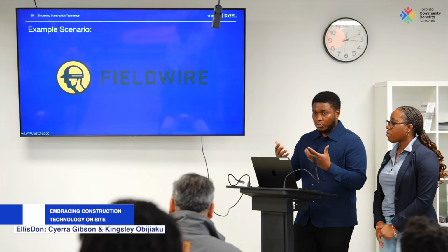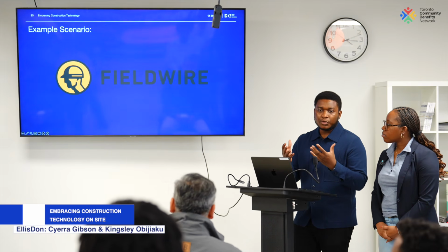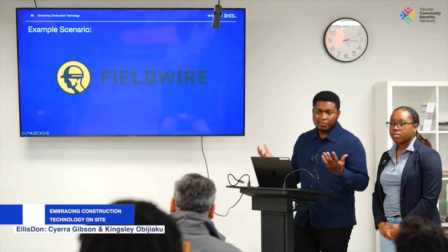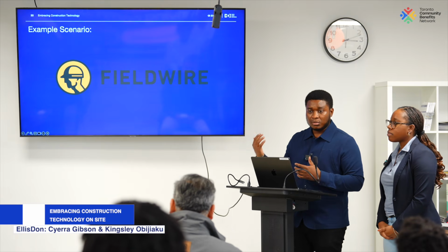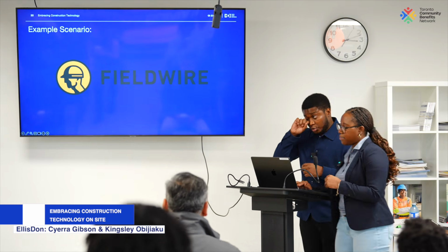How we use FieldWire, like I said, is to track progress, to communicate, and to share updates with owners and subcontractors. If you're a subcontractor, how you use it is slightly different. We encourage you to share progress reports, to communicate conditions on site, and to communicate with the GC, right? It's to track your own progress too, because if you want to get paid on time, you have to show us how much work you've done over a period of a month or whatever, and in a timely fashion as well. One of the best ways to do it is to use a tool like this. I'll just pop into the tool and show you what we're talking about.